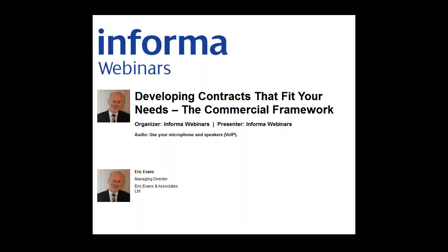Alternatively, you might want a different type of relationship with a supplier, one where risk is shared, one where instead of focusing on damages and service credits and compensation, we put a scheme of incentives on the table and say to the supplier, if you beat our expectations, we will generate more profit and we will be happy to share some of those profits with you. For example, we have negotiated contracts in the past with marketing agencies which said we will pay you £18 million in sterling, but if you manage to increase our sales by more than 5%, we will give you a £2 million bonus.